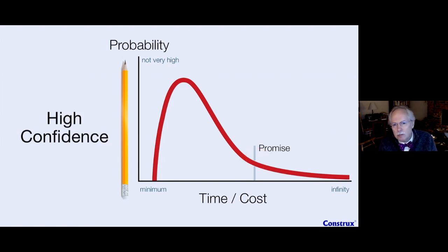90% confidence in many ways should sound unreasonable. It should sound like, well, there's no way it's going to take that long. And it should, because you should say 90% of the time, I should be on or before that number. I don't have to hit that number. I should be on or before. And we'll say, well, what if I put that number out there, they'll always be at least on it. And they'll probably even exceed it because they had plenty of time to do that.